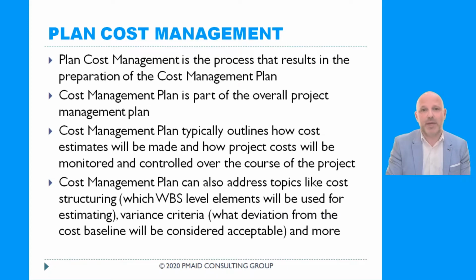Plan cost management. Plan cost management is the process that results in the preparation of the cost management plan. The cost management plan is part of the overall project management plan. Typically, it outlines how cost estimates will be made. We'll talk about cost estimates in the next slide. And how project cost will be monitored and controlled throughout the project life cycle.